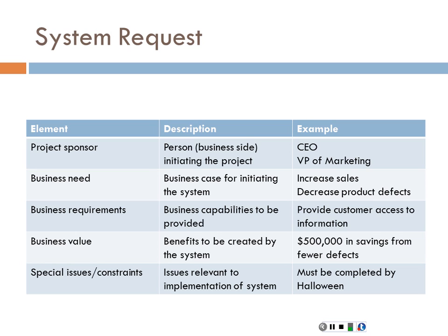And then any sort of special constraints associated with the system. For example, when Hershey implemented their ERP system, the main stipulation is that it had to be completed ahead of Halloween that season. Of course, theirs was a complete debacle. They ended up having problems launching the ERP system. And because of the timing, it was right before Halloween. They had no way of actually managing their retail customer orders for the product. So, again, timing is everything.